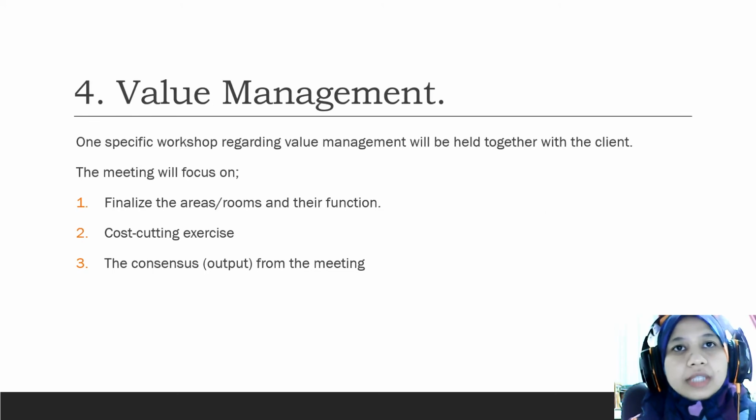Number 4 is value for money in terms of value management. So regarding this aspect, one value management workshop will be held together with the client. This workshop will focus on finalizing the rooms and their function to ensure the most needed rooms and spaces will be built within the budget.